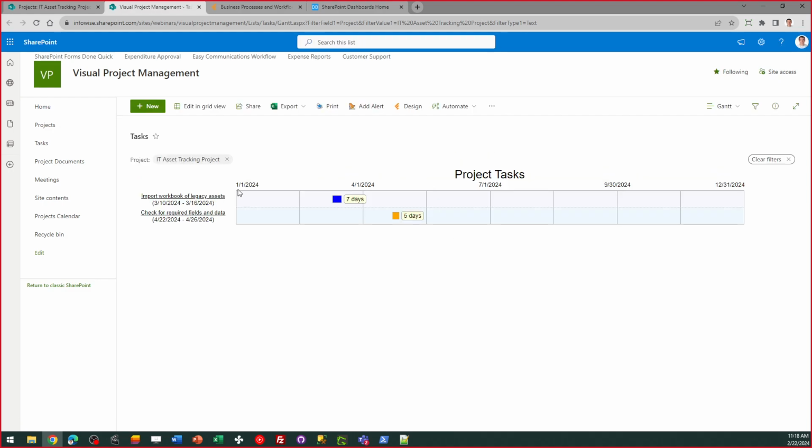Now this shows for the course of the year, the tasks that are assigned. It shows a couple things. It shows a bar, which is in length according to the start and the end date. And also it's color coded according to status. The blue one is not started and the orange one means it's in progress. So those colors are going to help us compare and understand open items in the project, things that have gotten started or the complete ones that are going to highlight in green.